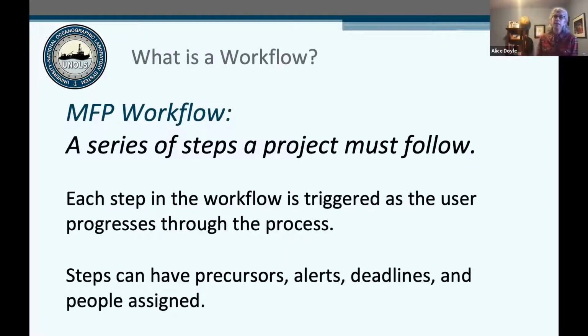Okay. So what is a workflow? A workflow in MFP is simply a series of steps a project must follow to be completed, right? Each step of the workflow is triggered as a user progresses through the process. So think about a workflow within our system: the PI must submit their ship time request before we can schedule, right? That's somewhat of a workflow. Each step in the workflow is triggered as a user progresses along, and steps can have, I should say, precursors.